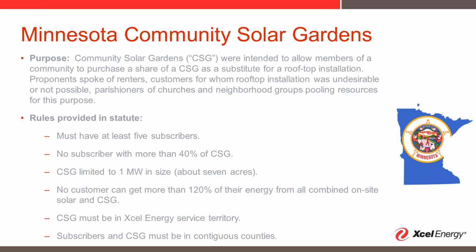As of 2016, any new applications are limited to 1 megawatt co-location, and so we no longer have new projects coming in at the 5 megawatt size, but we do have a number of them that are still going through the process. We do simultaneous queue studies, which is challenging, as you can imagine, because you have projects that we study assuming everything ahead in queue is going forward, but that doesn't always happen. And so a project can drop off and their cost can then transfer down the queue and we restudy.